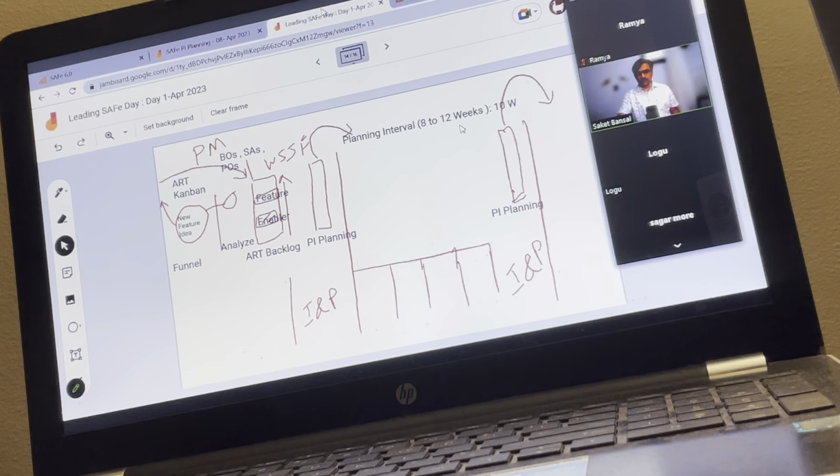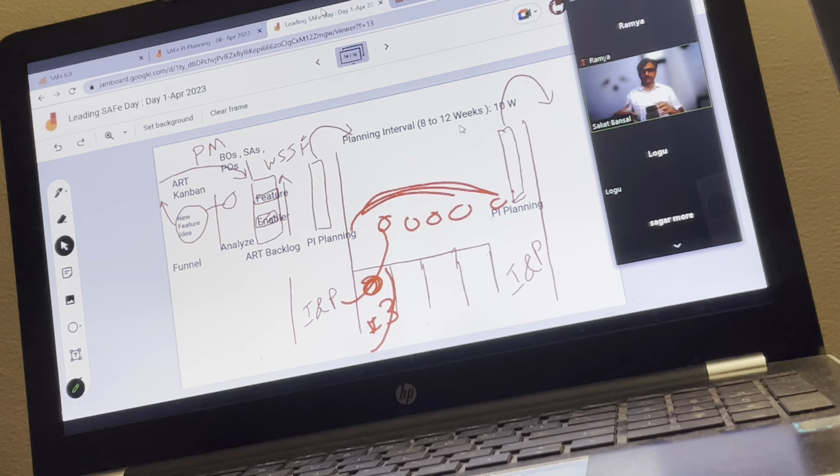This portion which happens inside the sprint, we learned in lesson 3 already. But what do we do in order to ensure some events and collaboration at agile release train level? So we call them ART events, equivalent to Scrum of Scrums. We call it coach sync, PO syncs. So some sync up meetings which bring you on the same page, and some kind of system demos.